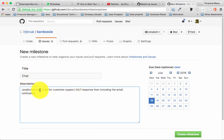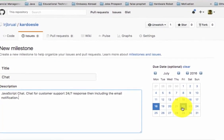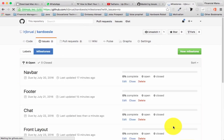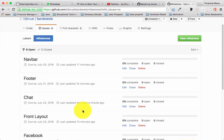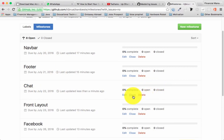That is the description for the chat milestone. I'm going to set the due date - I plan to work for five days on this, so I'll put July 22. Then I click 'Create Milestone'. You'll now see the chat milestone with the due date of July 22, the last update, and a progress bar you can update every day to track completion.